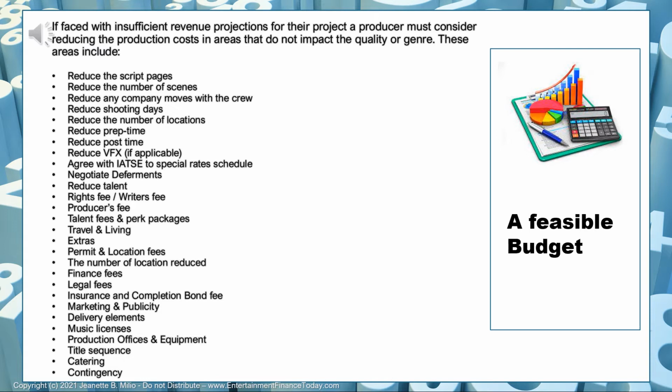You also want to use the post-production time. And it's always good to think about keeping post-production efficient, because it keeps your director online and on track. If directors know they have many weeks to edit the movie, they will take many weeks to edit the movie. So it's not helpful, and I've often seen that having more time to edit the movie does not necessarily make it better, because you start to question yourself, you start reinventing the wheel, and it's not always a good thing. So sometimes it's good to have your director on a very tight editing schedule to finish the movie, give you the director's cut, and then you as a producer go in and do your producer's cut.